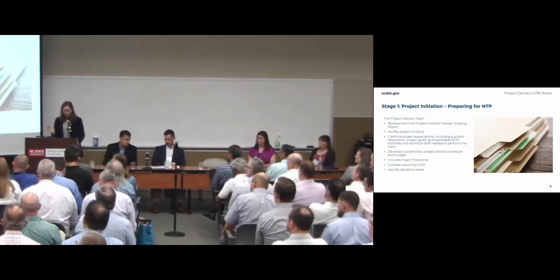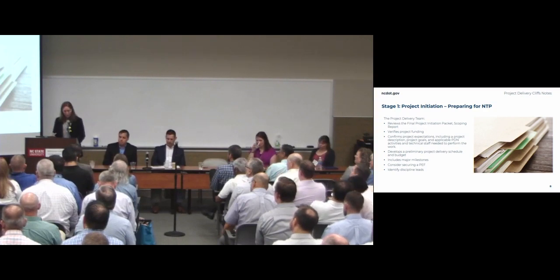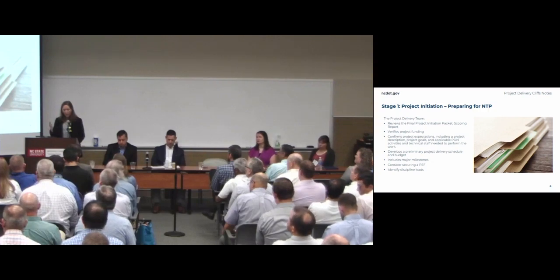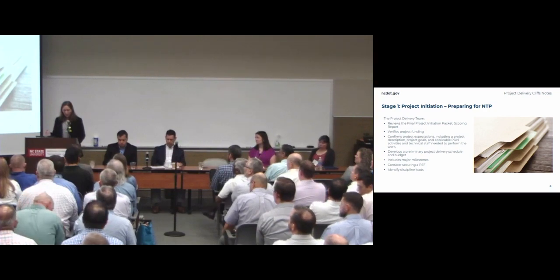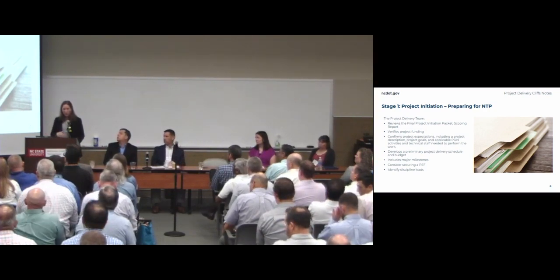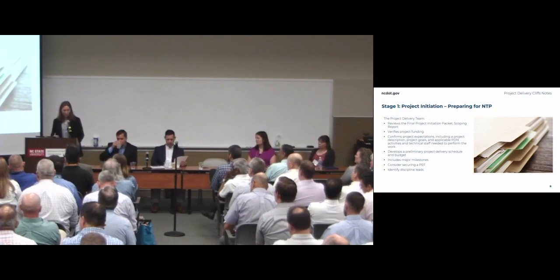In fact, I was recently included in a project scoping meeting where we talked through some of the scope generator tool. Everybody was invited and everybody was able to say what was expected, what needed to be included in the scope. Walking through that scope generator, even though it's got a few hiccups right now, we were able to review each of the needs in each phase by each discipline. We could discuss risks and milestones, coordinate order of operations if that needed to happen. The end result of that meeting was a scope that could lead to an NTP, since that is the goal of stage 1.